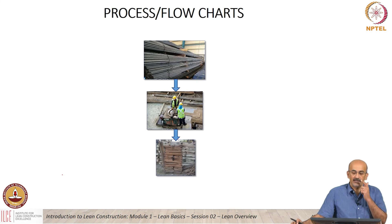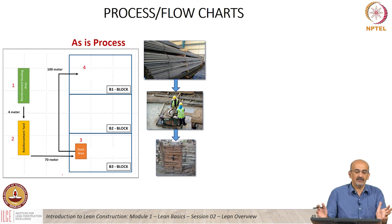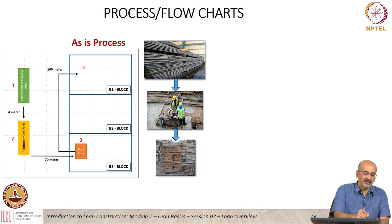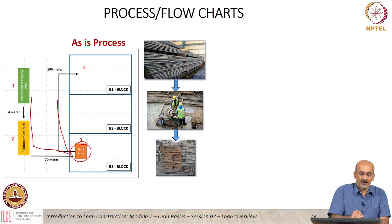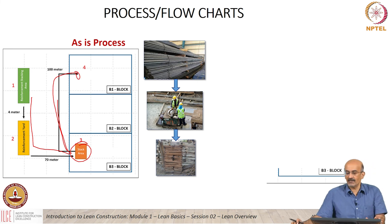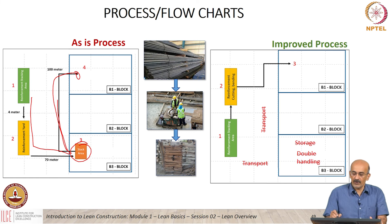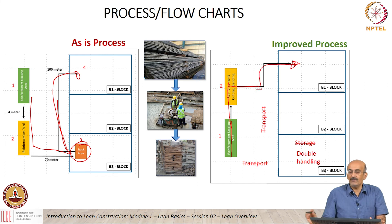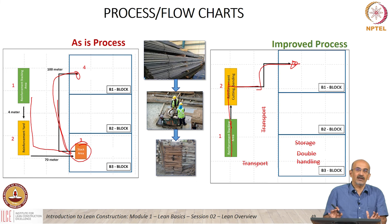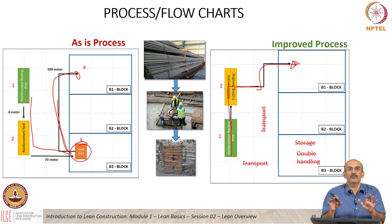Finally, moving to process and flow charts — taking the same rebar yard example, this is an as-is process where reinforcement is stacked in the yard, moved, and then transported to be placed. A process like this can be converted more efficiently into one where reinforcement goes from stacking directly to bending and cutting and then straight for placement, eliminating extra transport, double handling, and storage. Process charts generally look at geographic distribution and transportation that occurs, and try to improve efficiency by eliminating these extra steps which are not adding value.